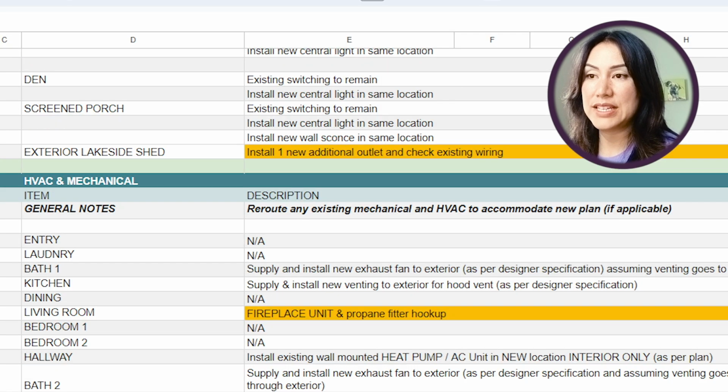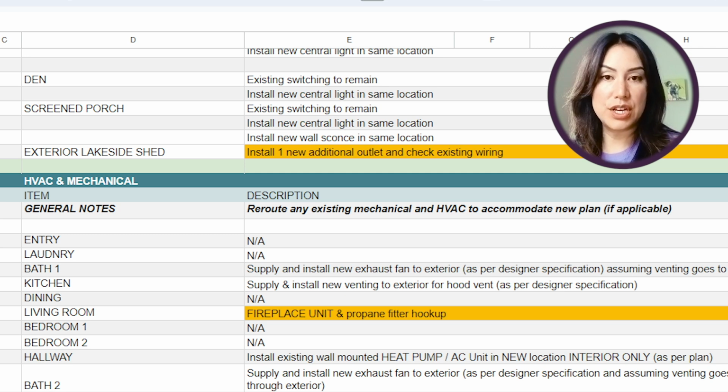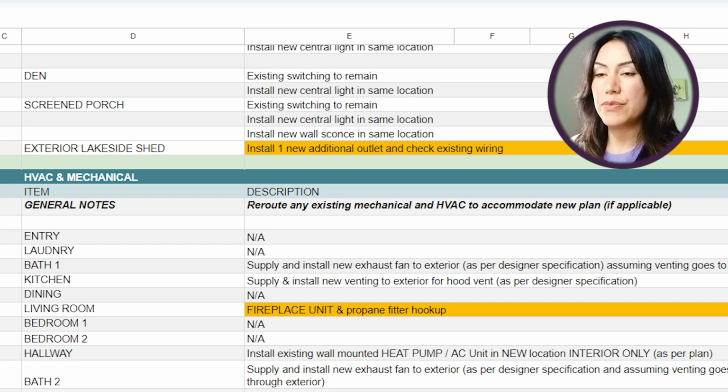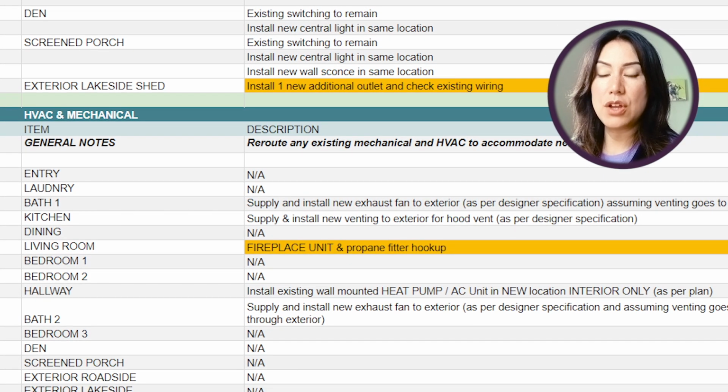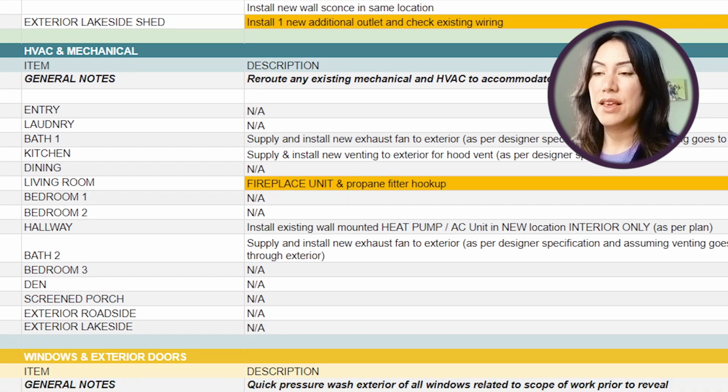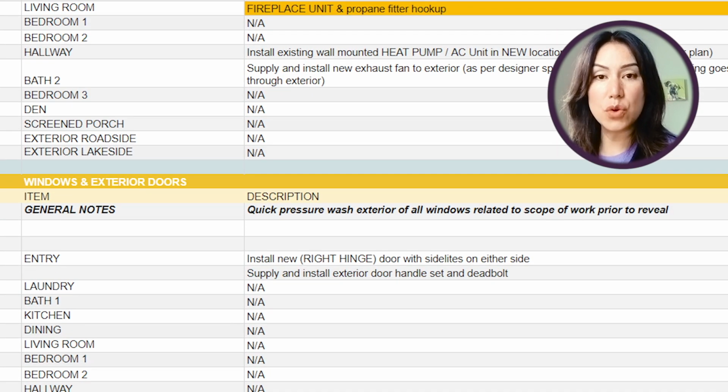The next section we have listed is HVAC and mechanical. In this particular project, we had a new fireplace and a new ductless unit for AC and heat, so we had to make sure to include it. You'll see that NA, not applicable, is listed in the description because it lets the contractor know we haven't forgotten about these rooms. There's just no HVAC or mechanical to note there. If you leave that empty, it leaves that question open. Don't leave questions open.